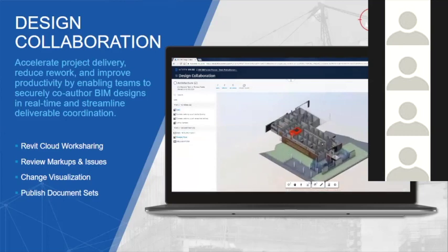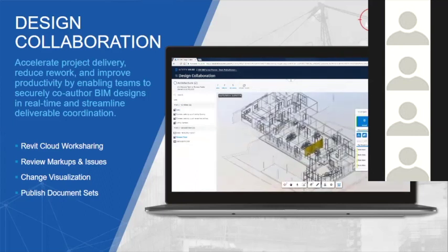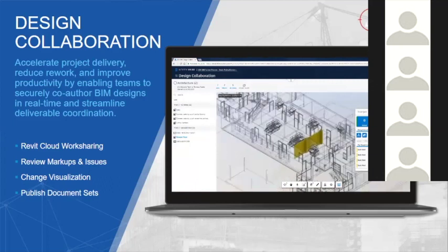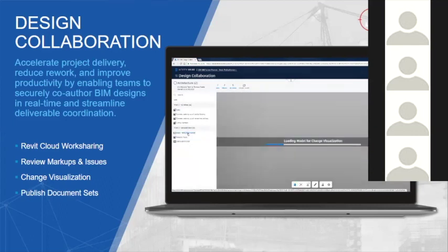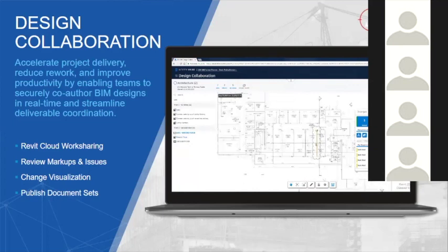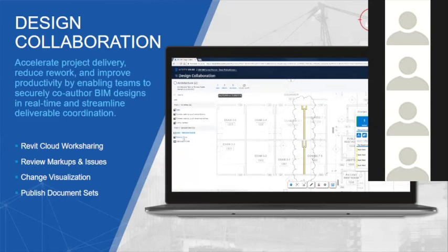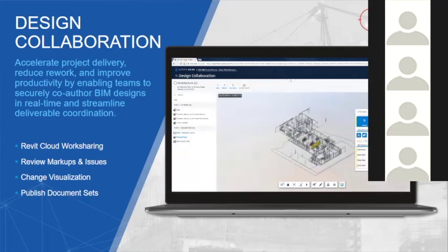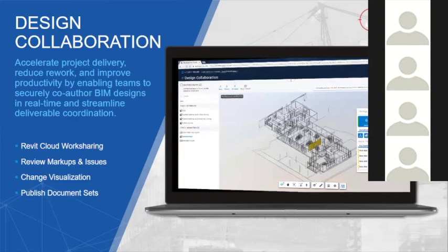Suppose I took a project, so there is a markup. If you see the walls and all, I'll tell him the changes. I'll just mark and say, this wall has to be like this, and I can assign it to a specific person, so that it should not be delayed. People can say, sir, I didn't see this, so I thought he would be doing it. In a team, if there are 3 or 4 people, they may escape saying I thought he would be doing that, that is his job. So those things also can be avoided by this.